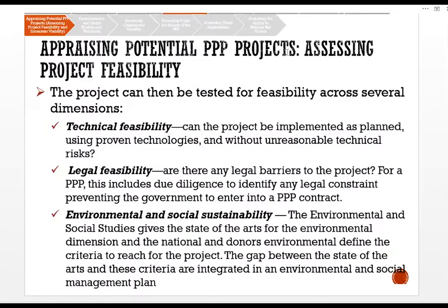Appraising potential PPP projects — assessing project feasibility. The project can be tested for feasibility across several dimensions. One: technical feasibility — can the project be implemented as planned using proven technology and without unreasonable risk? Two: legal feasibility — are there any legal barriers to the project as a PPP? This includes due diligence to identify any legal constraints preventing the government from proceeding with the PPP.